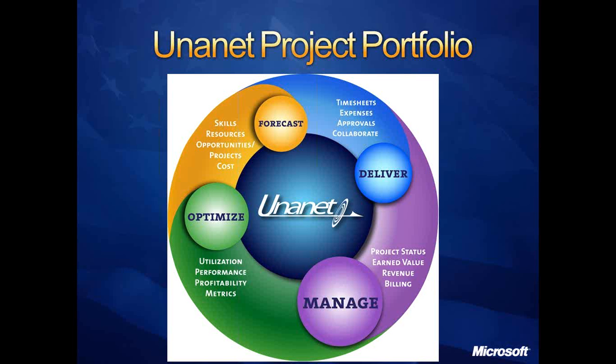Once you have the project in-house, you would use Uninet to track time and expense against the project, as well as doing approvals, and then there's a collaboration tool that allows project personnel to share information with each other. Having that actual data in Uninet allows you to run real-time reports on the status of your project. You can also do earned value reporting, burn rate reporting, and understand your project revenue.